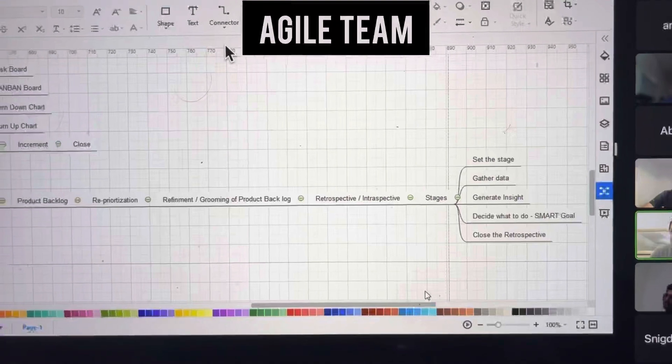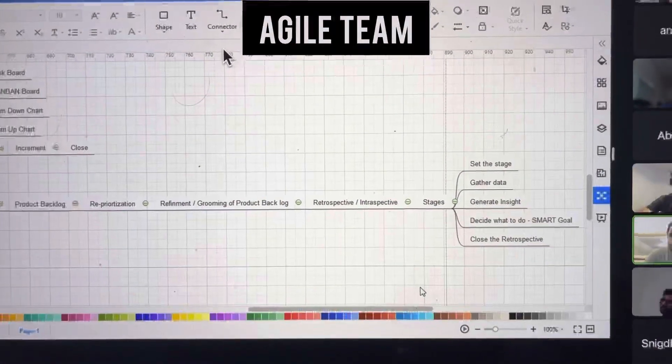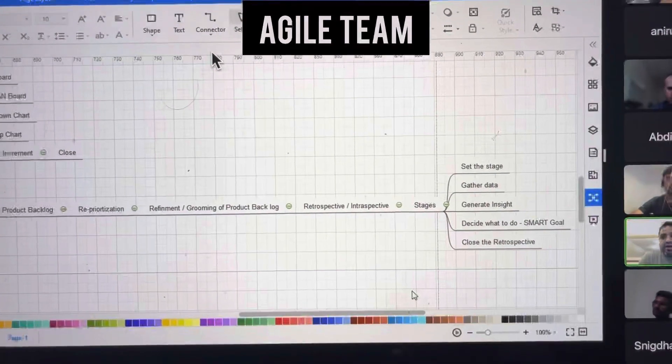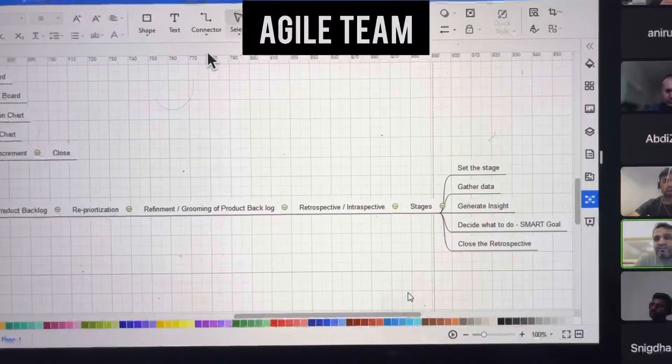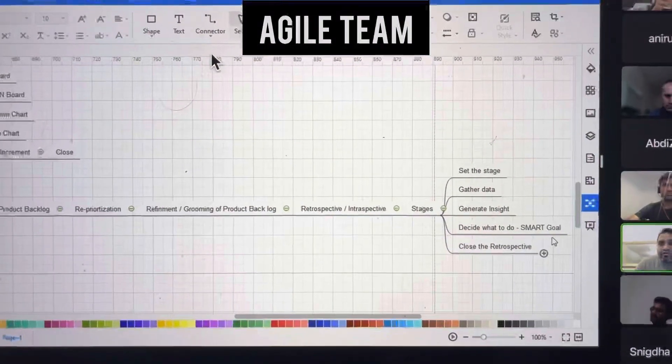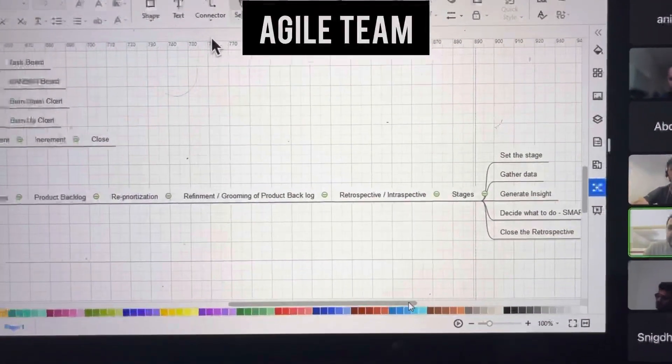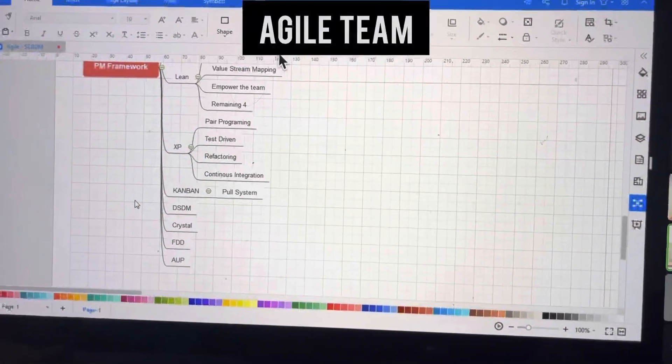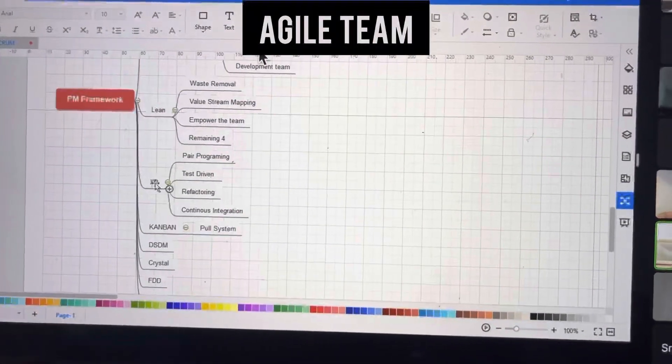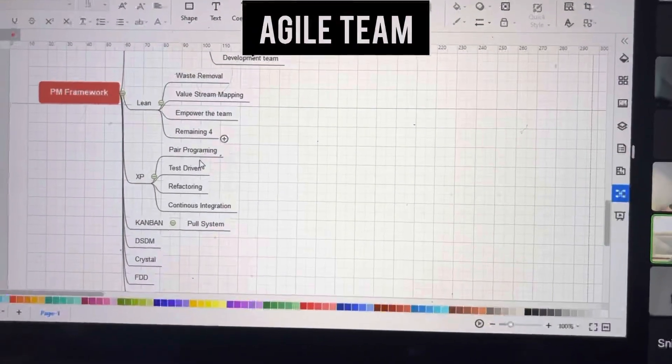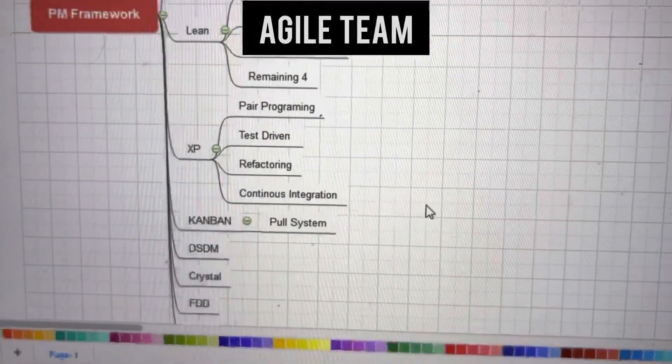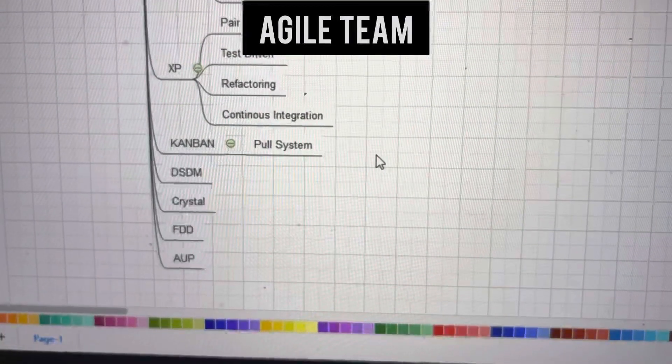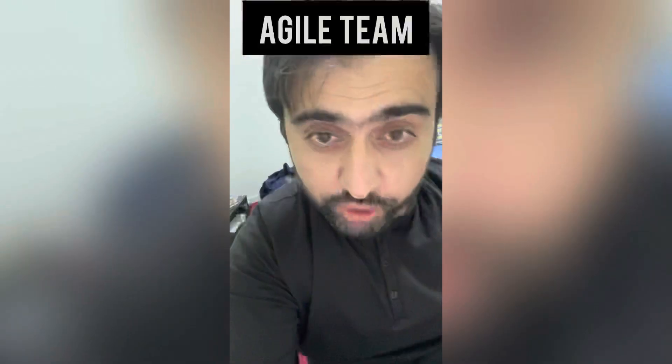The sprint retrospective is done after sprint review by the development team. It includes stages: set the stage, gather data, generate insight, decide what to do under smart goals, and close the retrospective. Other frameworks include Lean with waste removal, value stream mapping, empower the team, and deliver fast. XP has pair programming, test-driven development, refactoring, and continuous integration. Kanban uses the pull system, and there's also DSDM, Crystal, and AUP.